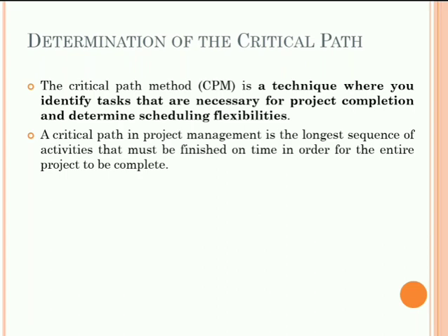There are good reasons why project managers benefit from having a good understanding of the float. It keeps the project running on time. Monitoring a project's total float allows you to determine whether the project is on track or not. The bigger the float, the more likely you will be able to finish on time or early. It also allows you to prioritize: by identifying the activities with free float, you have a better idea of which tasks should be prioritized and which have more flexibility to be postponed.